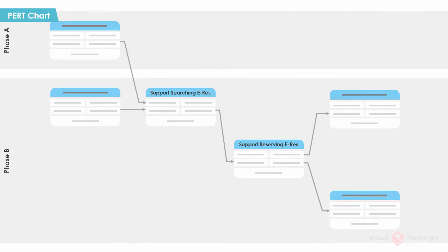Schedule activities. The scheduling of activities involves identifying the schedule of each work package as identified in the previous activity and their interdependencies using a PERT chart. A PERT chart stands for Program Evaluation Review Technique, which helps you create workflows, milestones, schedules, timetables, critical paths, and other planning requirements for a project. The connections between tasks represent their dependencies.